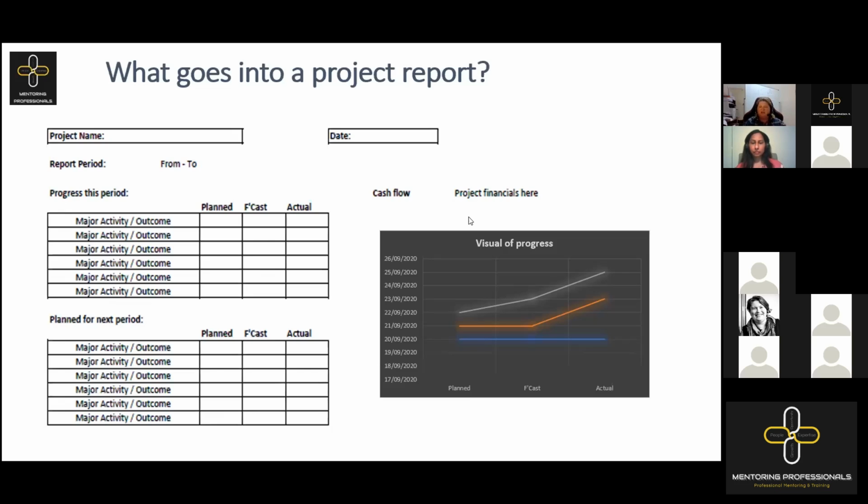That's one of those areas of tolerance. We do an impact assessment and decide whether it will fit within our project or be outside of the scope, and if necessary, escalate that change request upwards, so a change in scope itself. Why might we have change requests on our project report?